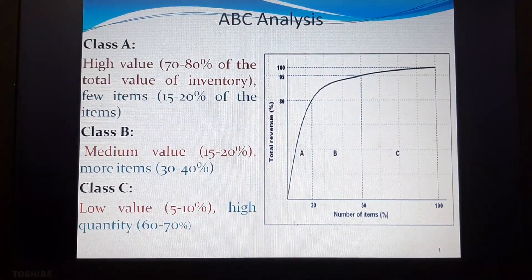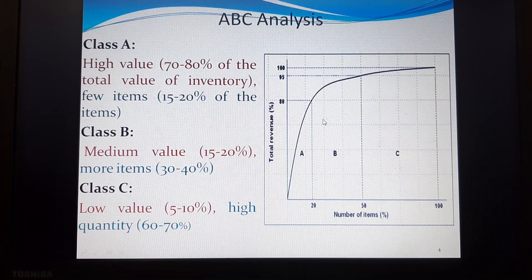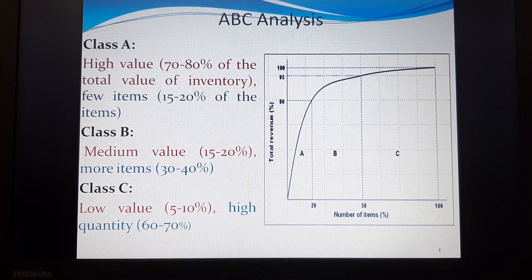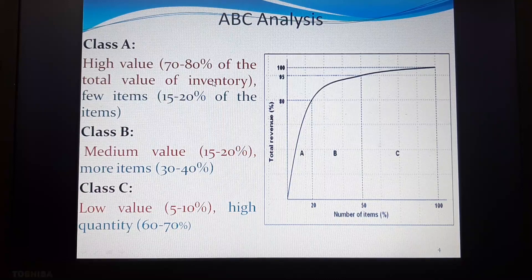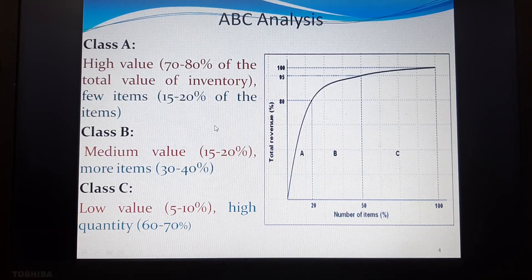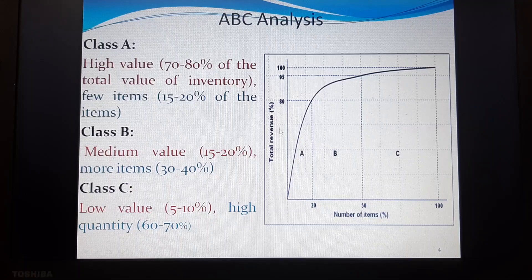This is one of the major graphs normally adopted in ABC analysis. We divide inventory into three classes: Class A, Class B, and Class C. Class A has higher value — about 70 to 80 percent of the total value of inventory lies in only 10 to 20 percent of the items. You can see that the number of items is almost 20 percent, yet they account for about 80 percent of the value.